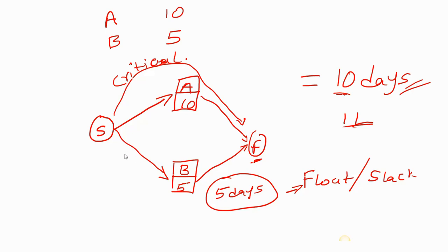So you will notice that in our P6, the activities that have float, or the activities that are not on the critical path, are the ones whose bars are green in color. And the ones on the critical path are the ones you see with a red bar coloration in Primavera P6. So that's essentially how to interpret the figure that you've gotten from your Gantt.